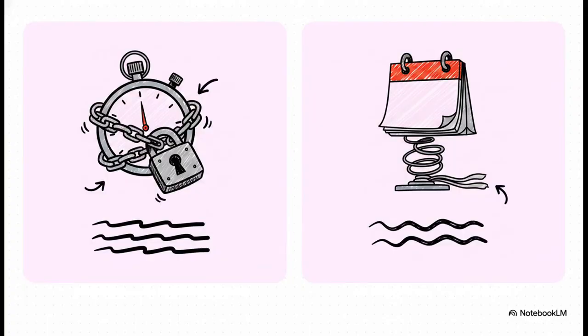Now, once you have all those tasks laid out, you need to understand their flexibility. A critical task has zero float, meaning if this task gets delayed, your entire project deadline gets delayed, period. A non-critical task, however, has some float. That means there's a bit of schedule flexibility in there. It can be delayed just slightly without pushing back the final project delivery date.